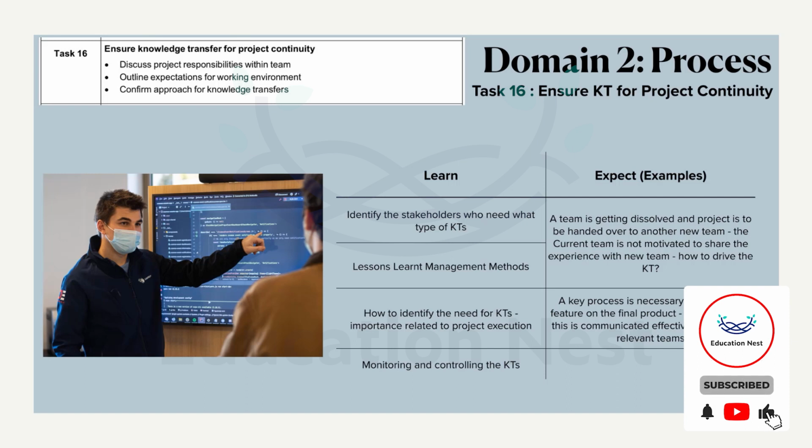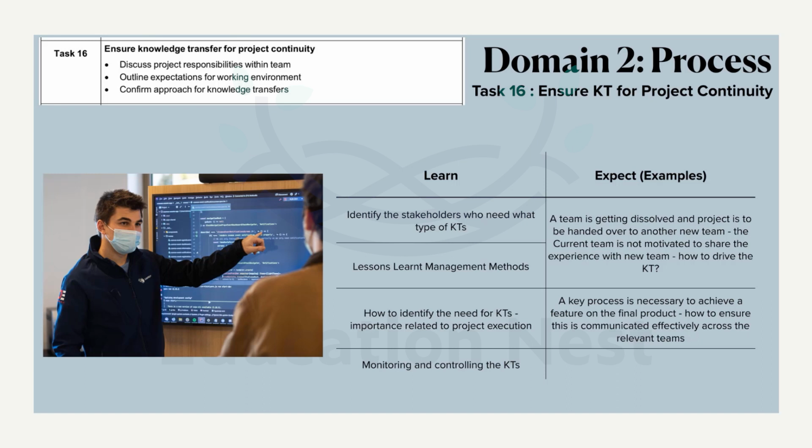This is experience collected in the form of an artifact from previous projects. The organization might have experience in doing similar projects in the past. Even if it doesn't, the lessons learned register is a live document which is maintained throughout the project. When you are in the initiating phase, you face some difficulty and solve a problem in one way, and you can record it. A person has found a solution to a long-pending problem which the team feels is repetitive.